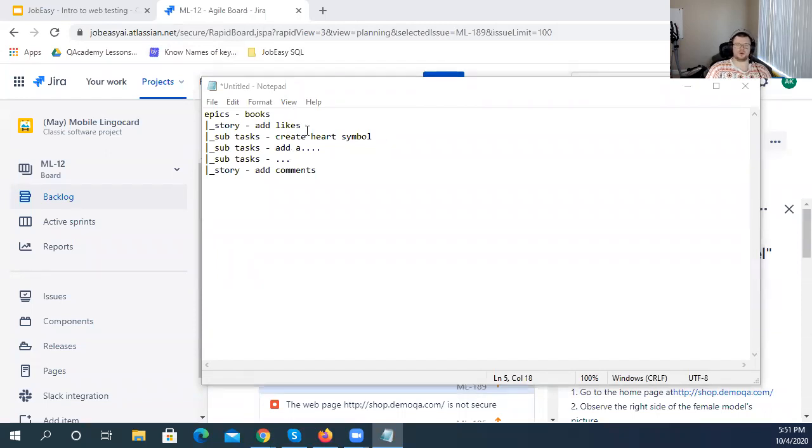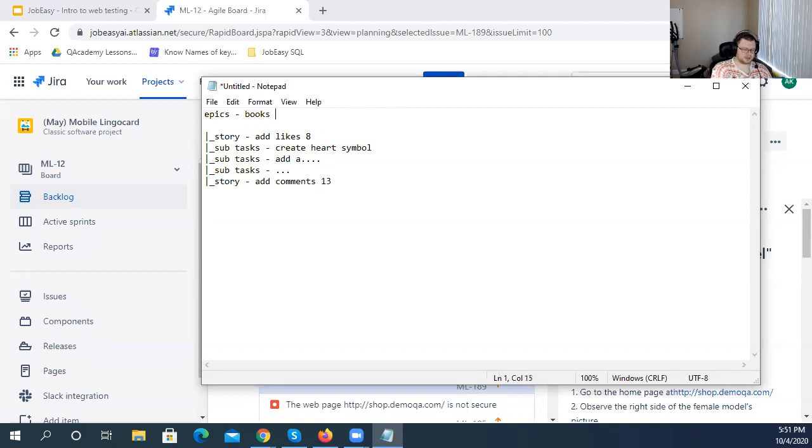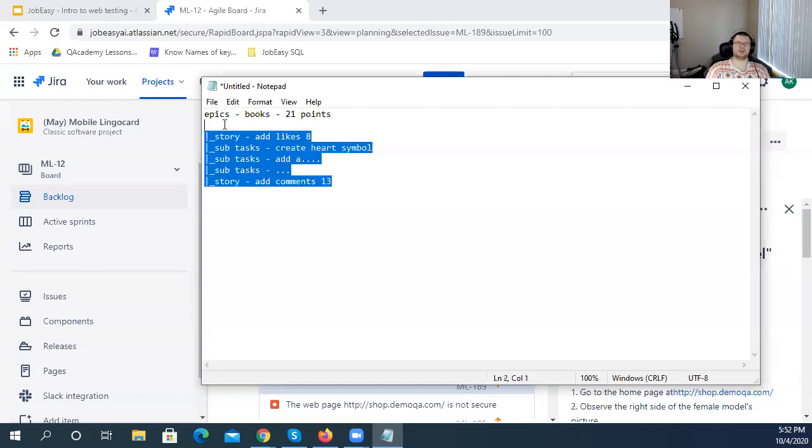All right. So again, if this story is like 8, and then this story is like 13, this entire epic is already 21 points. So again, points are measured in the Fibonacci sequence, and they don't necessarily say how long something will take, but more the complexity, but it still relates to the time. So for a 3 points story, maybe you can finish it in 3, 4, 5 days. You can't go over 13 points per sprint because it's at least 2 weeks of work, right? Epics do not get completed in one sprint, but stories from the epics are selected that will be completed within this sprint.